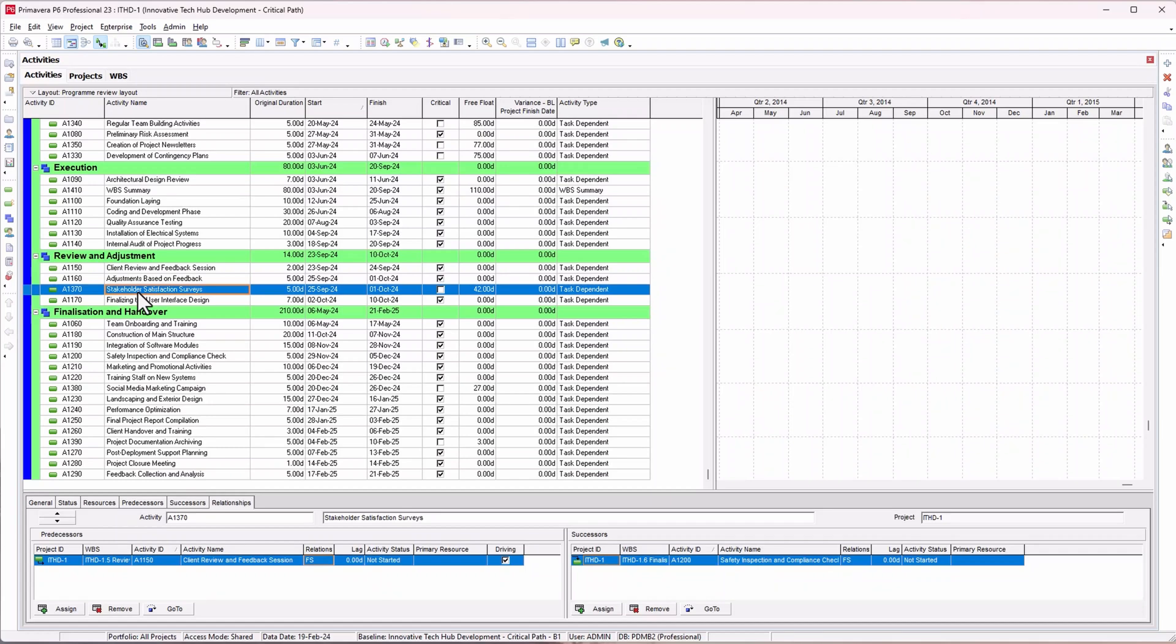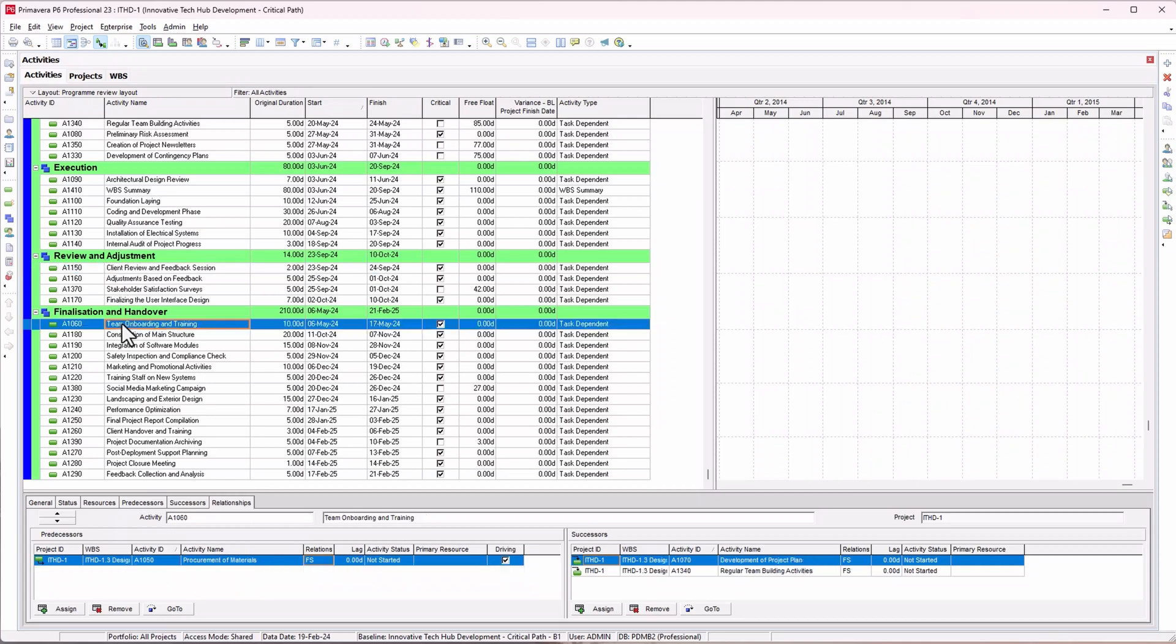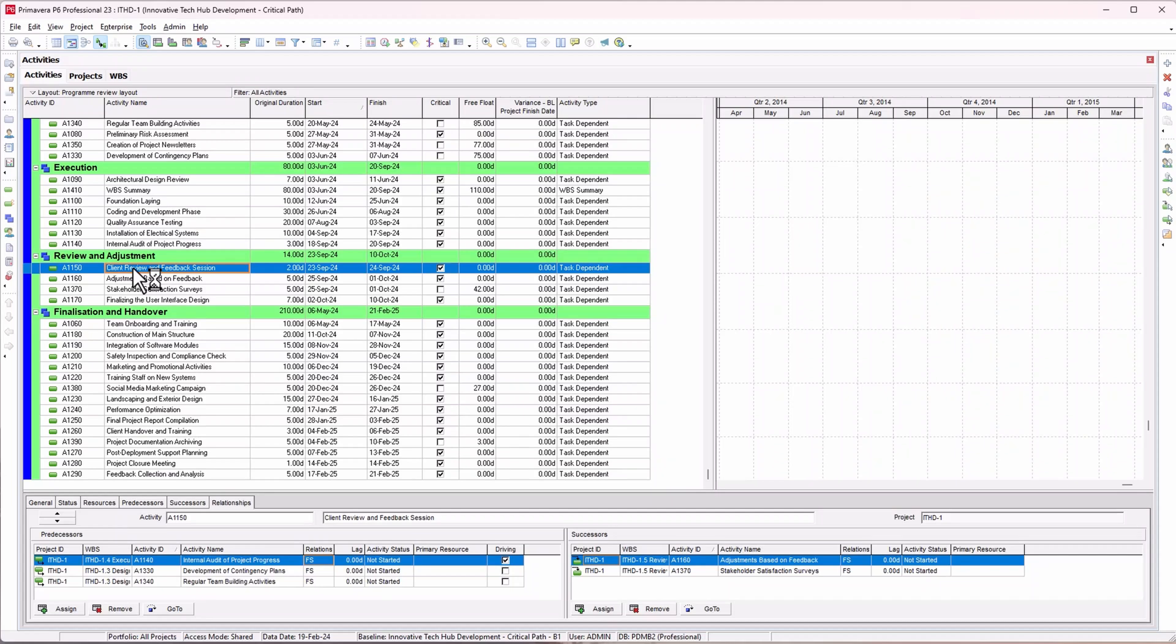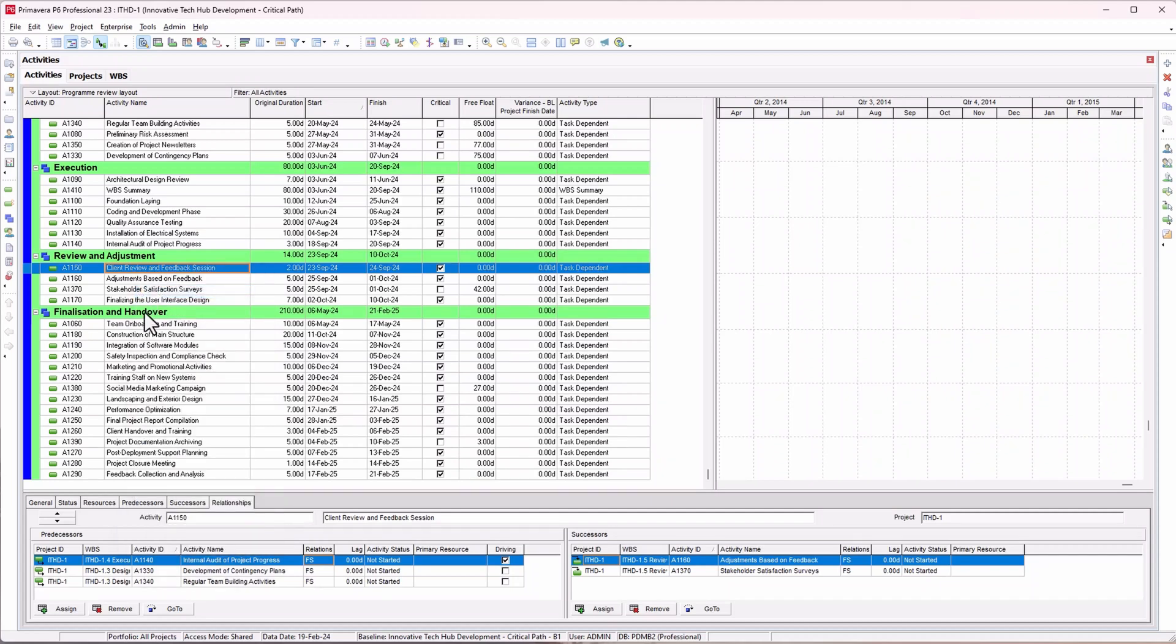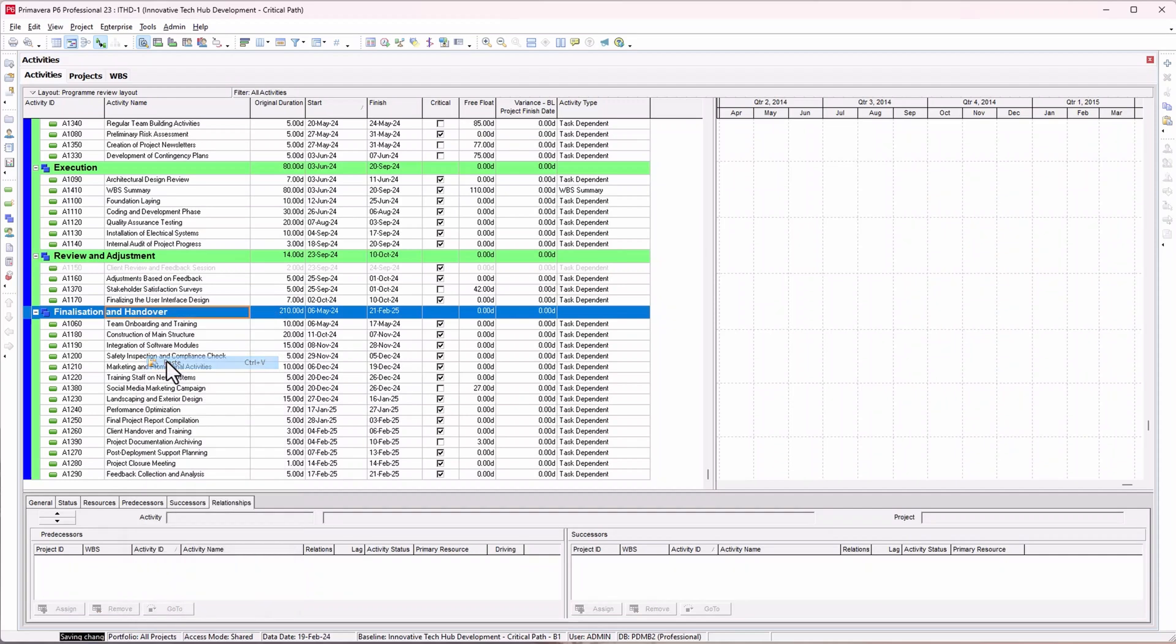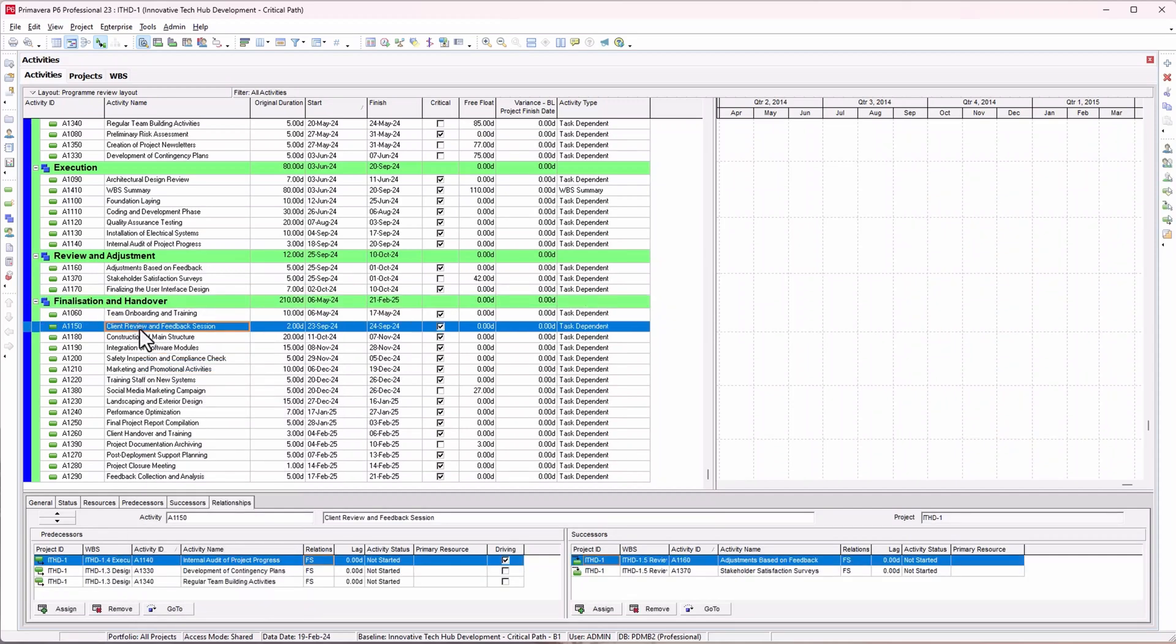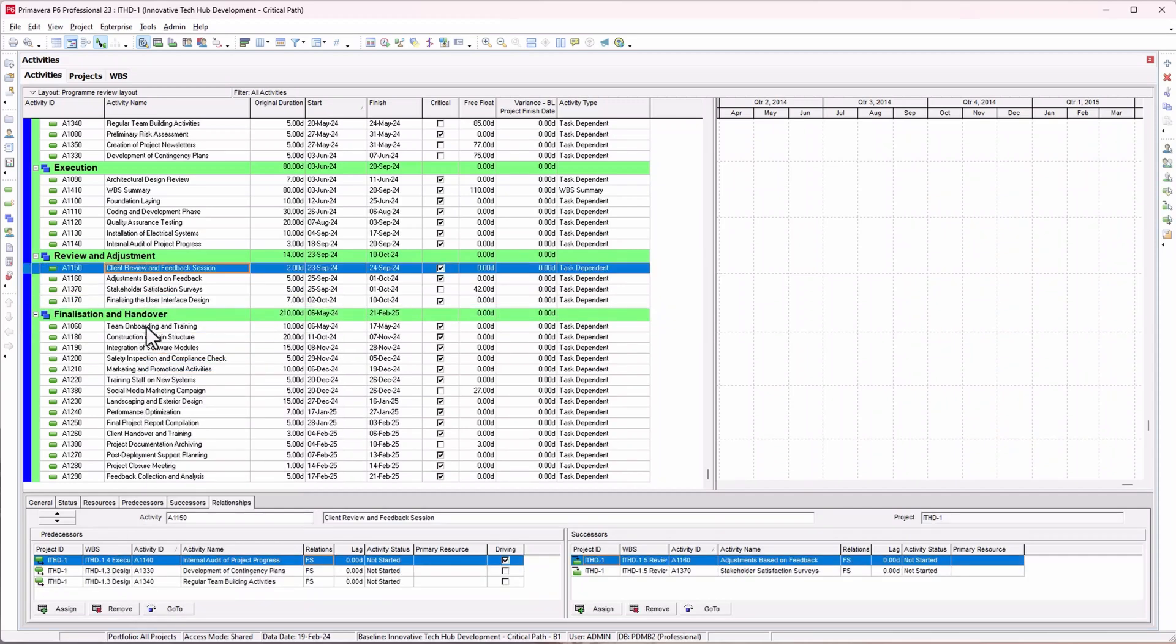Let's say this is my project and I need to move an activity from this client review and feedback section. Let's say it needs to go into finalize and handover. I just need to right-click and cut it, go to this WBS and click on paste. Now I have it in that WBS.